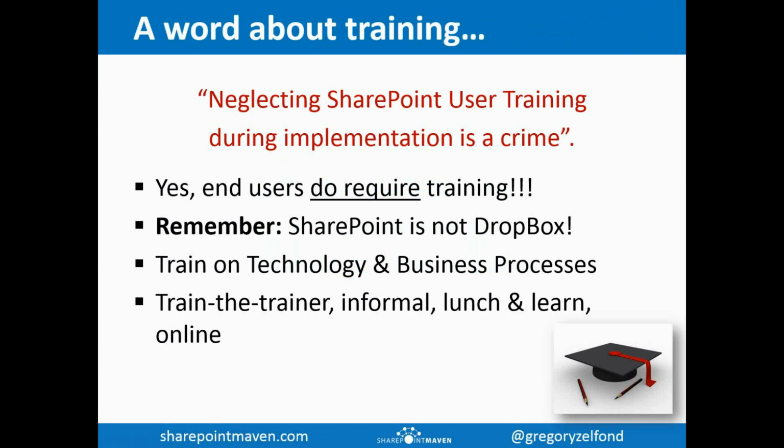So if you're implementing a project site or HR site, at the very end, once you go through all the phases, you need to do training. The next few sites you're rolling out for different sets of users, you implement those sites again, and you need to do training again. And the reason is, first of all, you might be dealing with different users to begin with.